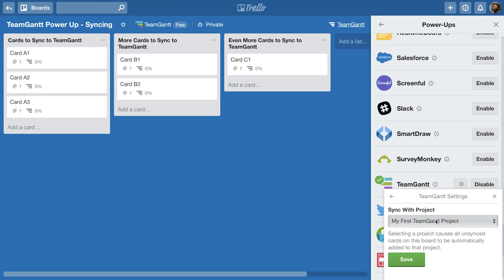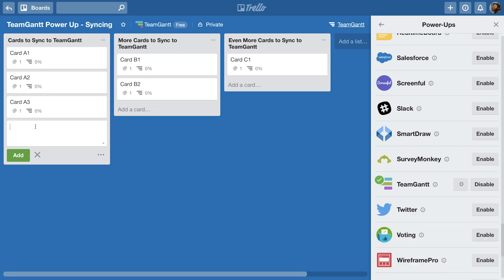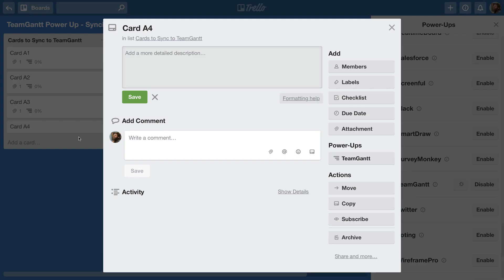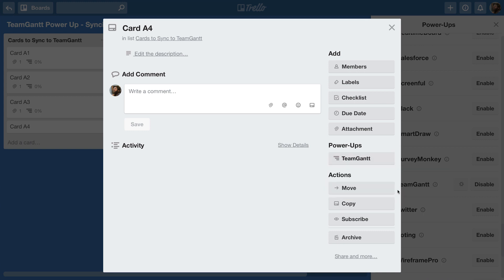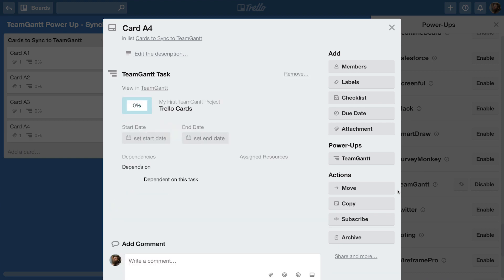If you're manually syncing your cards, you can add cards to your TeamGantt project by clicking on the card you want to add and select TeamGantt under the Power-Ups header. Then, click on Add Card to Existing Project. Click the name of the project you want to add the card to and that's it! Your card is now linked to a task in TeamGantt.